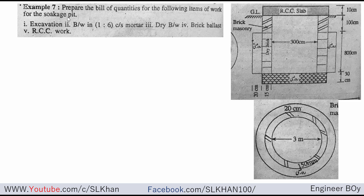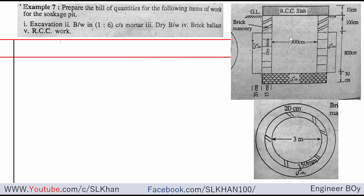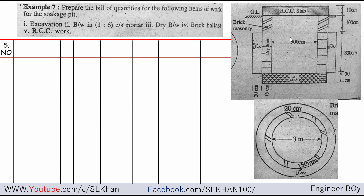As you can see in these diagrams, this represents the plan and this one is the cross section, or you can say long section. We're going to prepare the bill of quantities and I'm going to do this work in a nice table which contains the column of number, then the description, then the number of items, length, breadth, height or depth, and then the quantity and a remark column for detailing if needed.